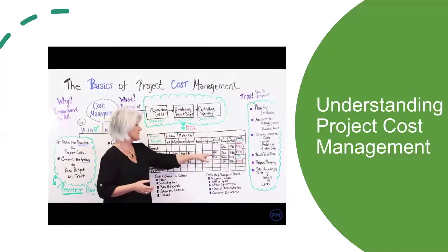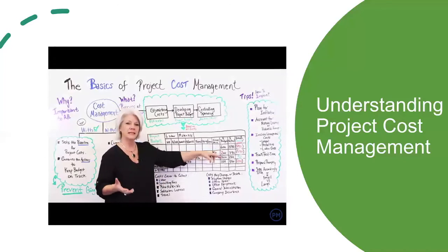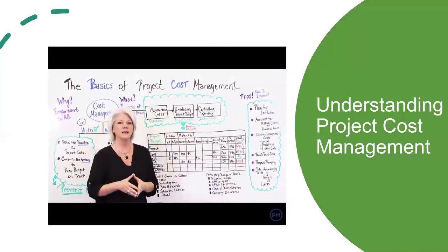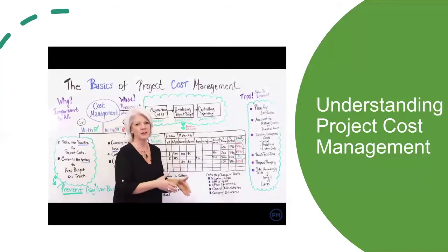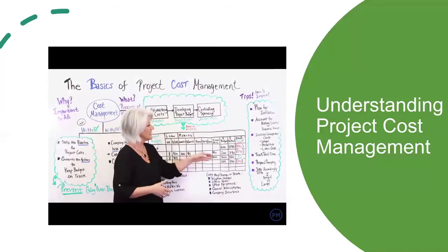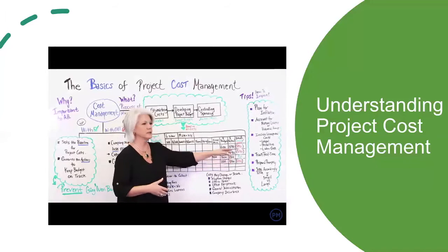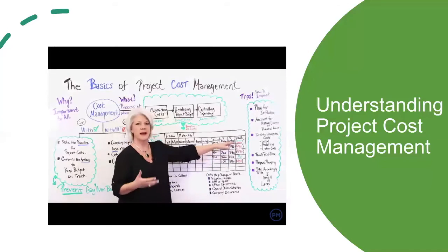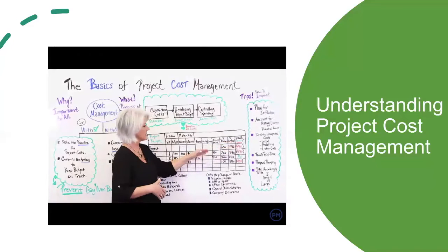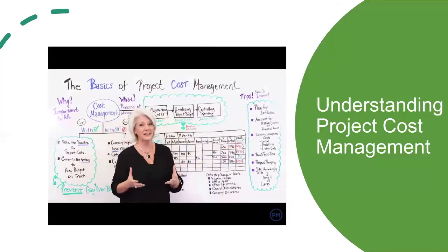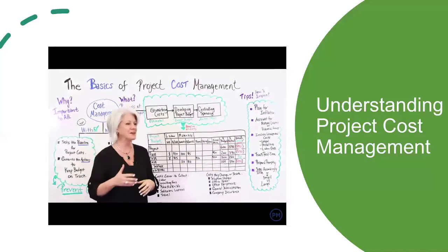Then at the task level, you have your budgeted amount, and as you track along the way, you ultimately get to what it actually costs for that task. In the end, for every task, and even at the full project level, you look at where you come out. Are you under budget or over budget at the task level and at the project level? And again, we're looking to go under budget.